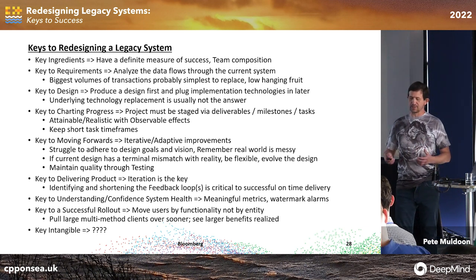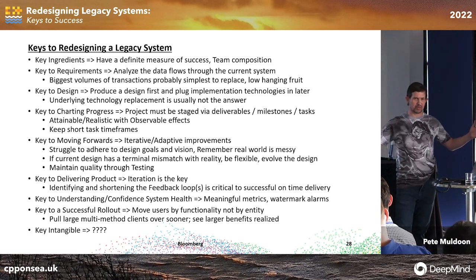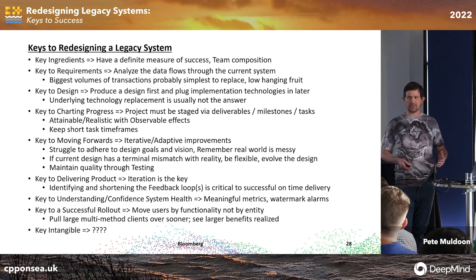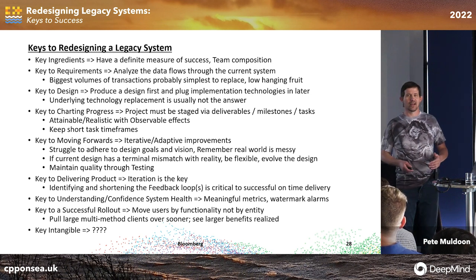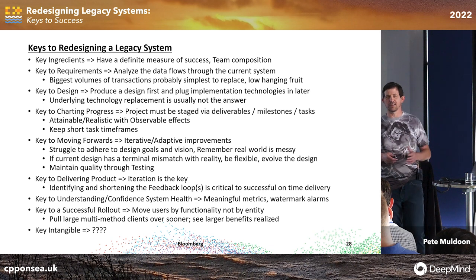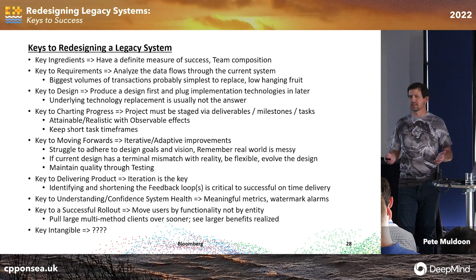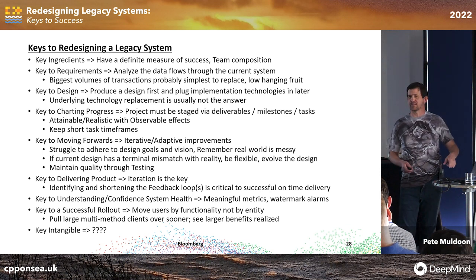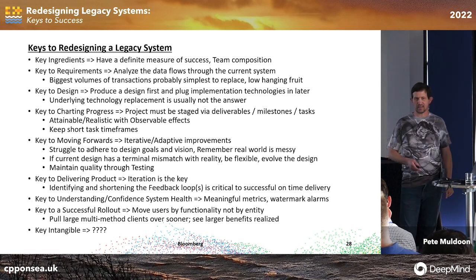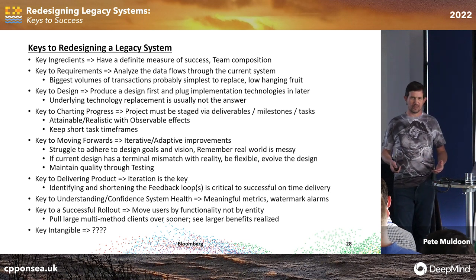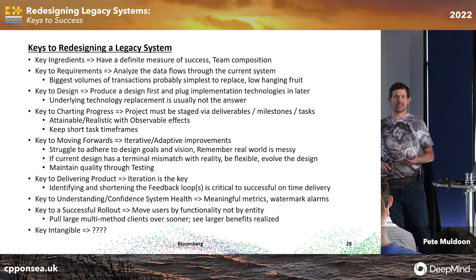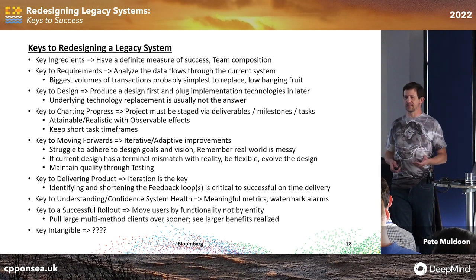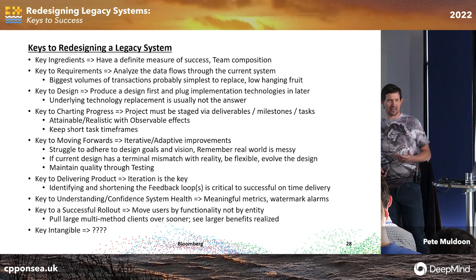And when you limit scope, it's better to deliver something successfully with a small scope than not deliver something with a very wide scope. Once you deliver something, it gives everybody the belief. The current project I'm on had some real problems, and when I joined it, I think no one believed it could be done. It's a very large system, porting it to Unix, and I ported a major part of the functionality to Unix, and business and everyone just said, oh wow, this can actually be done. All of a sudden all my future phase timelines got rearranged because everyone started saying, me first, where before everyone was like, I don't care where you put me in this timeline because I don't believe it'll happen. So once you actually deliver something in production, you have credibility, or political capital, whatever you want to call it. You have more ways to push your weight around to make other parts of the system start to meld with what you're doing.